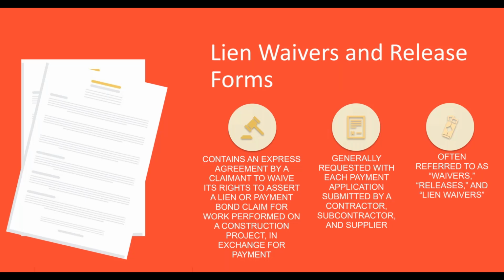And this gives upstream contractors, owners, and of course lenders reassurance that the project is going according to plan as the work progresses. And just so everybody's aware, I'll continue to say the words lien waivers because it's a lot easier than saying lien waivers for lien claims or payment bond claims. But everything that I'm saying applies to both lien claims as well as payment bond claims. So as for some background on lien waivers and liens in general, many state statutes establish a contractor's right to assert a mechanic's lien or a payment bond claim after performing work.